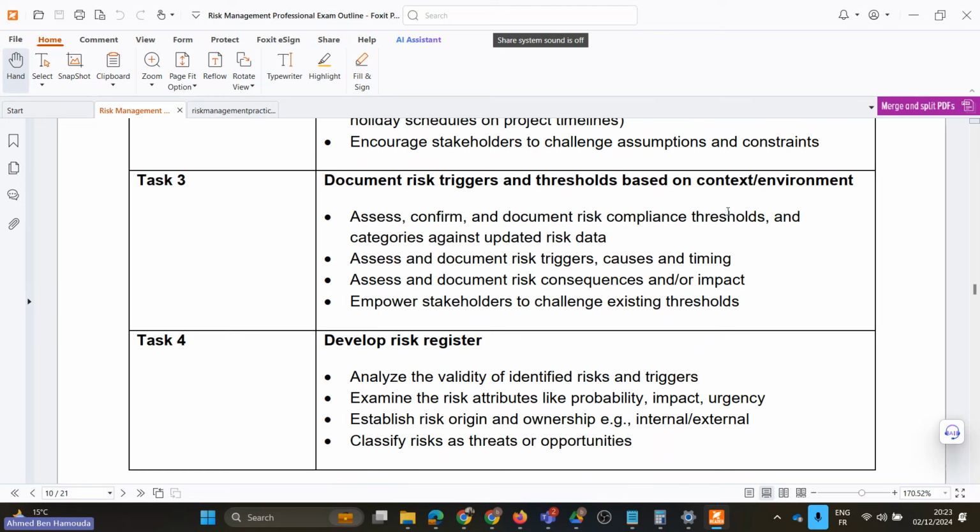And implementing an action plan is actually a waste of the project's resources, for example. Well, while we do understand what they said, maybe we have trust in them, but that's not what the risk management plan says. The risk management plan says if you have a risk that exceeds the threshold, you absolutely need to implement an action plan, a mitigation plan. If you don't, then you're breaching the risk management plan, and that will be detected during the risk audit. Okay, we will see later on about the risk audit for closing the risks.